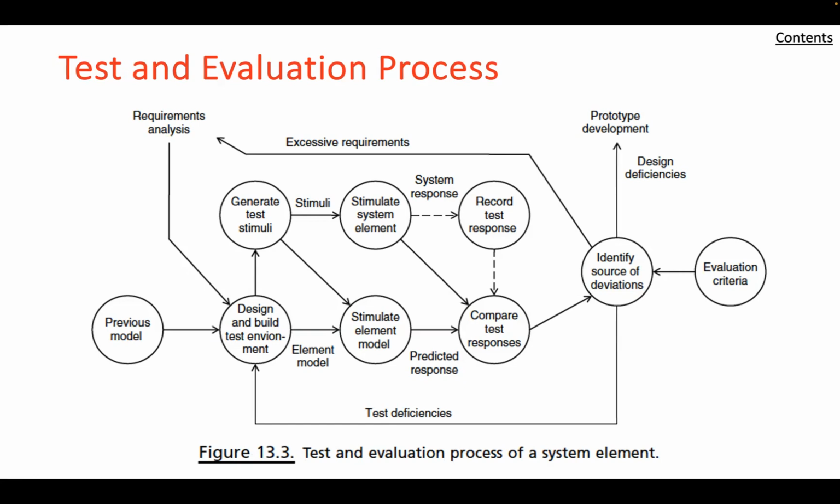And so there's a system introduction, having the mission description, operational requirements, measures of effectiveness and suitability, system description, critical technical parameters. There's the integrated test program summary. So it talks about the test program schedule, management, participating organizations, and includes the development test and evaluation, talking about the method of approach, the configurations that will be used, test objectives, events, and scenarios.